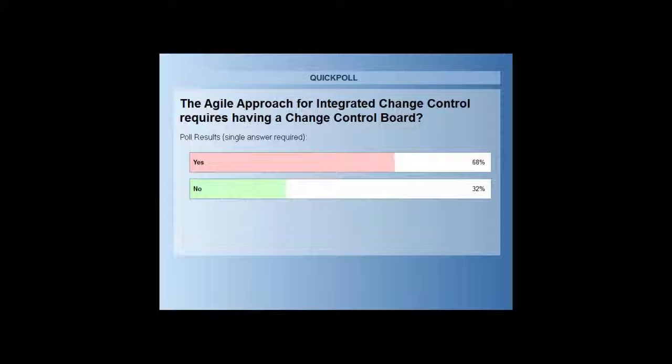If we take a look at those from the Agile perspective, for preparing a scope management plan, we just try to commit to following the Agile framework here, or the Agile approach, where we use the backlog and decide what is the scope from the backlog. We plan the iteration, and decide what is the scope for each release, each iteration, and for the overall project. So this is what we do.